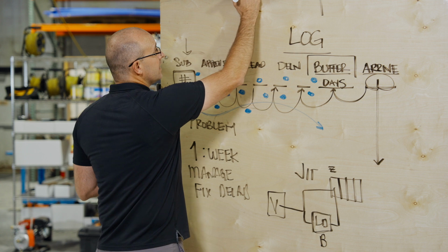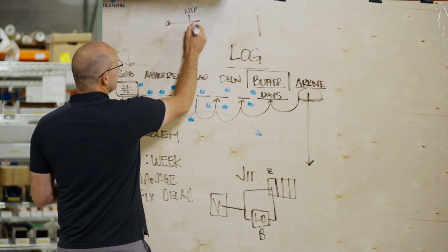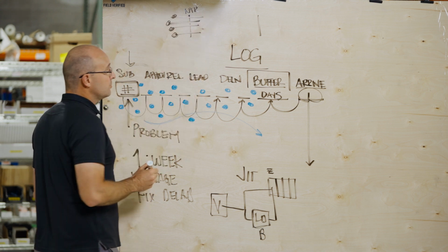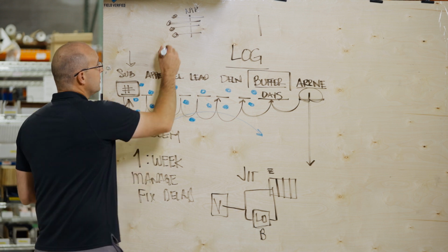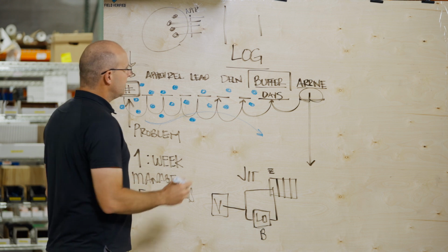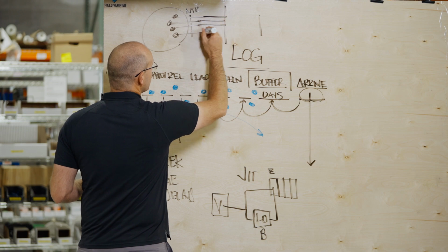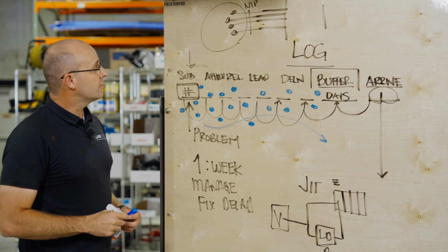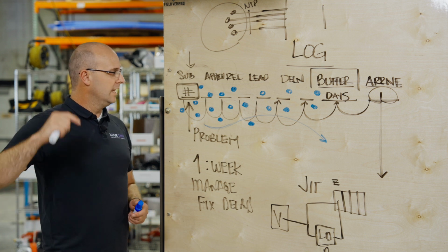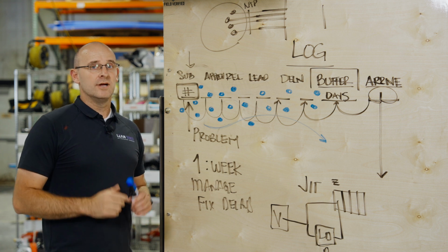So when you get an NTP, you should have already started coordinating elevators, exterior curtain wall, long lead items, switchgear and electrical gear. If you don't start in pre-construction, you won't have it when you need it. Procurement is always about being out ahead and being proactive. So when you get that next job, the first thing you do is create a schedule. The second thing you do is create your procurement log, and you start getting after it, because remember this, if we can get the materials here, they can build it.